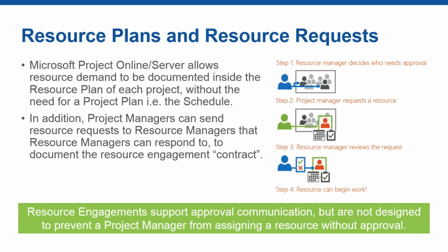Now, going forward, there's been a quite significant change in that the resource plans are now built inside your project, because your project consists of a project plan, i.e. your schedule, as well as a resource plan. There are two different data entities inside the same project, and that allows you, if I have a blank schedule with no tasks, to still assign resources at the project level and simply start speccing out how many people I need over time, for example. That you can do through Project Pro for Office 365 or Project Professional 2016. It's similar in terms of its features.